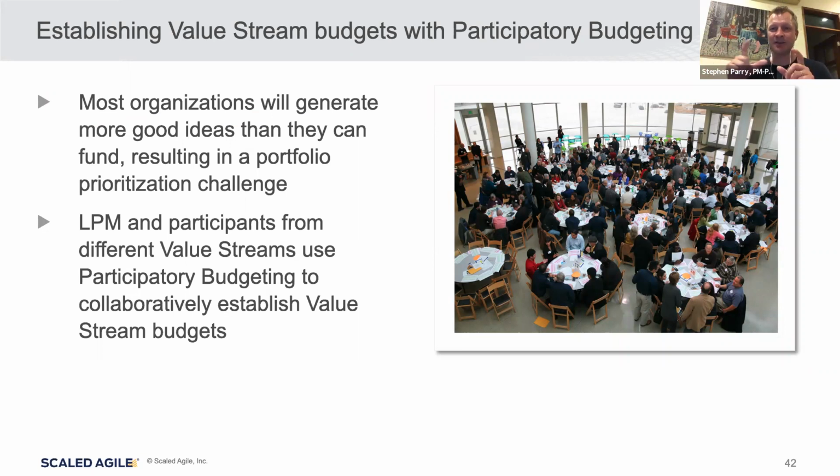No, as I'm saying, clients are still setting their budgets for the value stream work annually. Although I'm getting to the point where clients are realizing they need to do it more frequently. So we're talking about half yearly, which is actually what SAFe recommends. But you might even take it to quarterly and adjust it just ahead of your PI planning. As John said, we're not seeing that yet, but they are talking about it, which will give them a higher level of agility, Mariana, so they can then switch funding to different release trains.